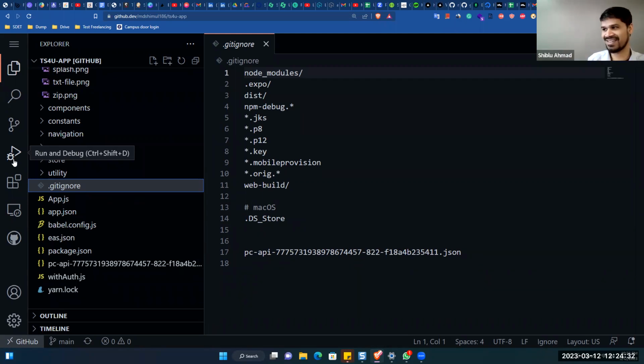Sure. But things should start from the Agile ALM. Nobody can write a line of code. They cannot touch a line of code without it being on the backlog. In the environment, nobody can touch the code. Nobody can add a dot in the code base. So if you want to report an issue, you have to create a bug. Or if you want something changed on the Agile ALM, you have to create a story. That's where everything starts. It starts from there, gets prioritized and analyzed from there, and then needs to come to the sprint. Then the developers will start working. Otherwise, they cannot touch the code base.